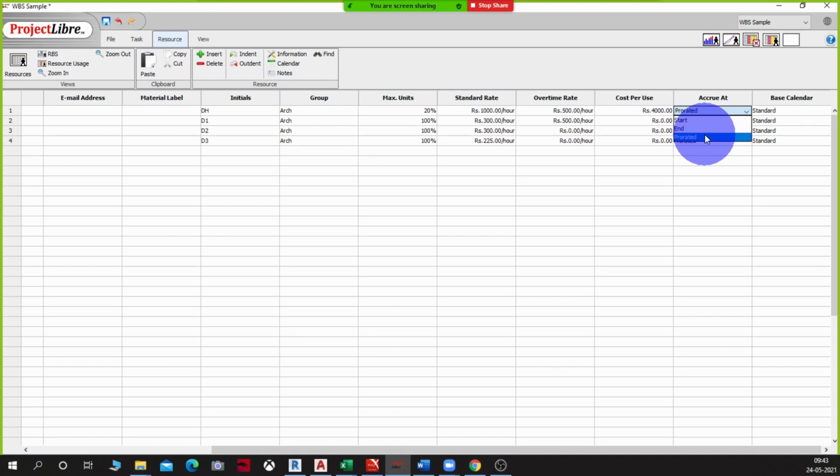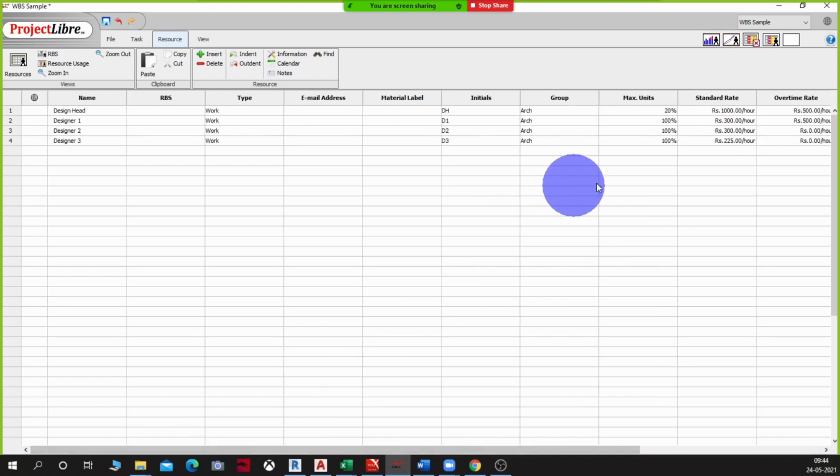This is very, very helpful when you are doing EVMs. So when you want to do earned value management calculation, you will have to be clear about how this is getting billed to the client. Okay, so the most commonly accepted is pro rata basis. So we will keep it at pro rata. You can do start and end, you can experiment with that as well, no issues. Okay, the next thing here